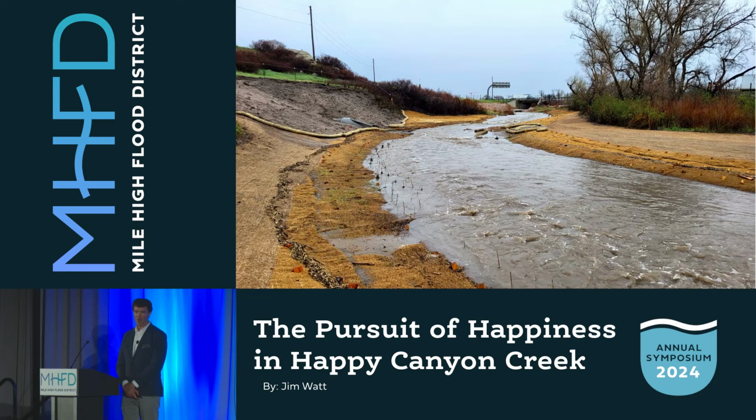Unfortunately, this is what the channel looked like for the month of May last summer. In total, we had 17 days of just weather delays, and really the rest of the month was spent trying to recover from these flow events. So definitely a stressful time to be in the major drainageway construction business.